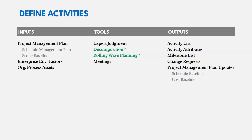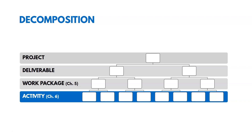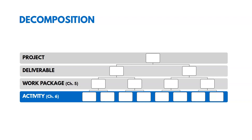Decomposition is just breaking down work. In scope management we created a WBS with work packages at the lowest level — I like to think of those as nouns, like a roof, walls, or foundation if we're building a house. Then we break those down into activities, which I think of as starting with a verb. For the roof work package, activities might be: hire a roofer, buy the materials, install the roof, test it for leaks. Rolling wave planning means near-term work is planned in detail, and future work is planned in less detail — we know more about things starting sooner.